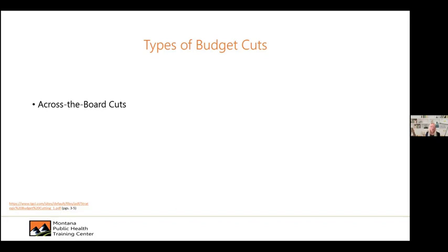So one of the biggest things for us to take away from this part is, even if you're going to get your budget slashed by a certain percentage, it does not mean that you just have to walk right down your budget and say, okay, 10% off of everything. That's not the most useful way to talk about doing that. So if we talk about the percentages, this should still allow you to evaluate the degree of cut so you can keep doing what you're doing, right? Maybe you're actually going to cut something at 15%. That will free you up some money to not have to cut something else. So understanding your budget and where you're actually spending the money, all of the things that we've talked about up until now, can make it so much easier when you're handed this, oh my goodness, I have to cut 10%, okay?